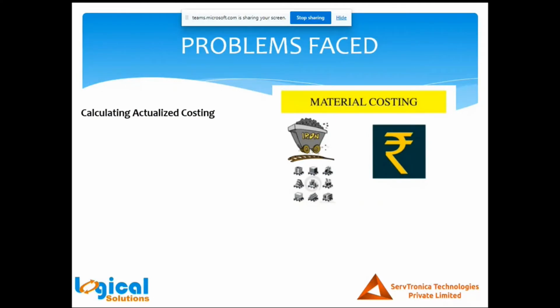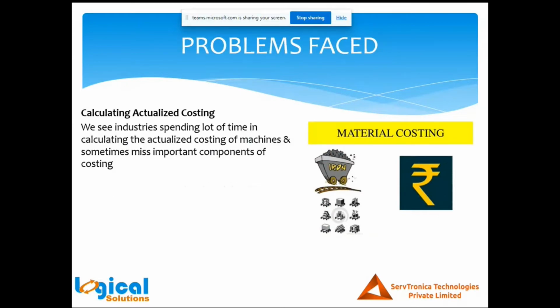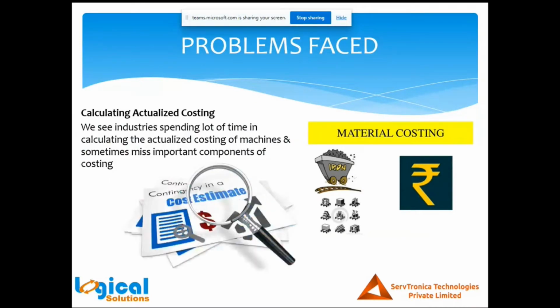Costing is another challenge. When I'm building a machine, I need to have the cost of the complete machine, right? For calculating the cost of a machine, I need to consider all the necessary major cost components of the project, which is basically driving the project. So it could be the raw material, the engineering cost, the transportation, packing, etc. Right?